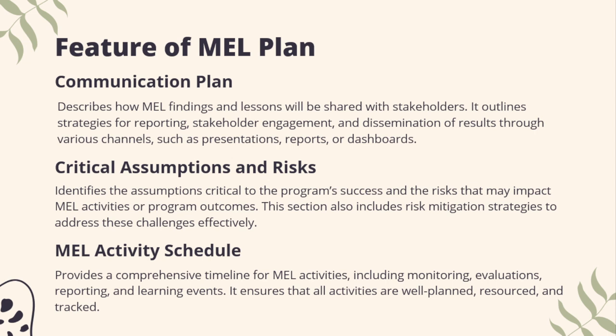Another feature that you need to have in your M&E plan is the critical assumptions and risks. You need to document some of the critical assumptions that you anticipate. Once these assumptions hold, then you're going to achieve this success. You also need to document the risks, okay? Based on the project that you're implementing, there are certain risks that you may have to encounter, economic or geographical risk. You need to document that. Then the other thing that you may also want to include in this section is the mitigation. How are you going to mitigate those risks that you're going to encounter as you are doing your M&E activities and even as you're implementing your project? So you need to document that in the critical assumptions and risks.